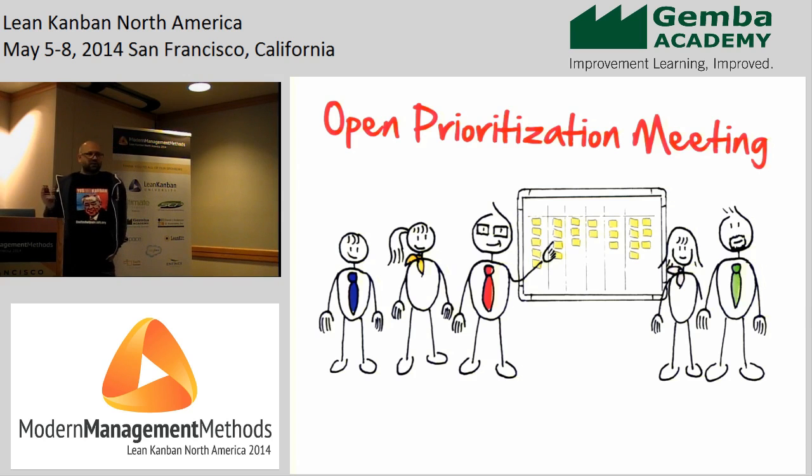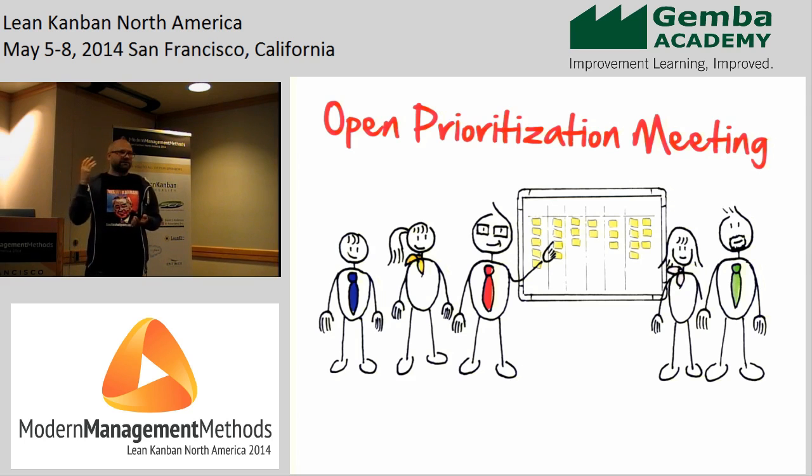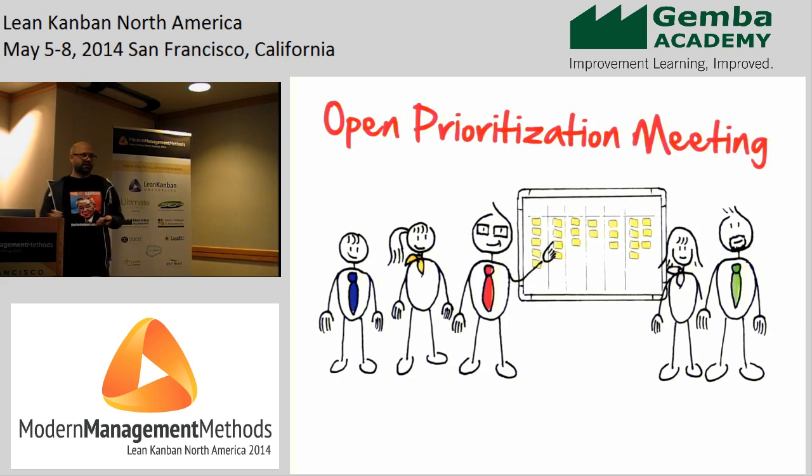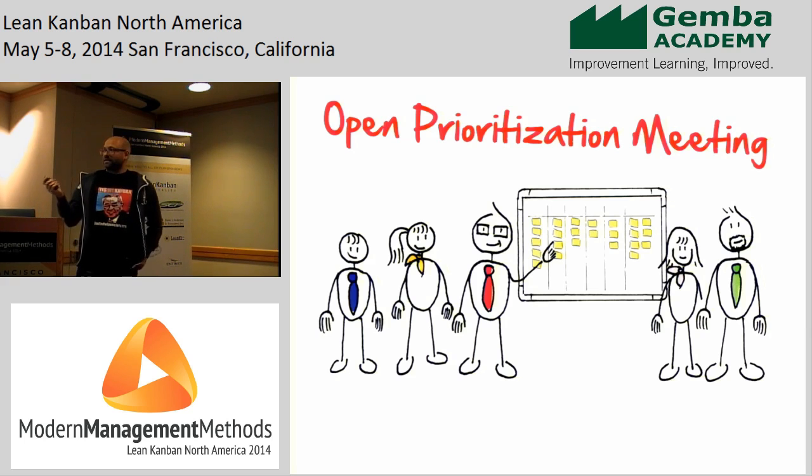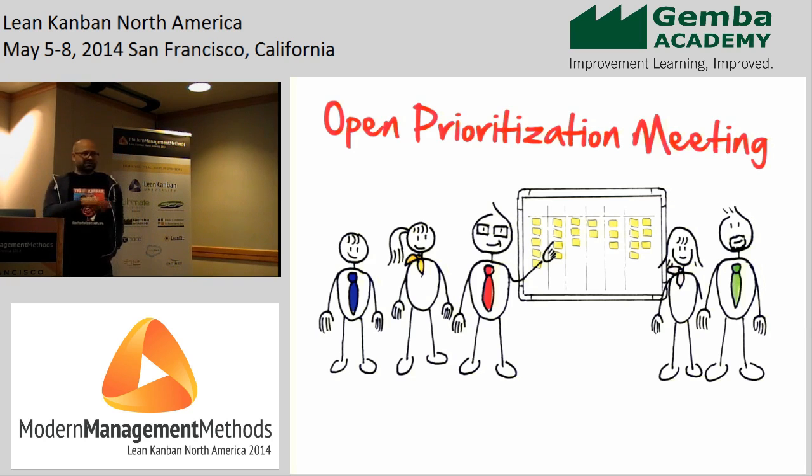And now, at the beginning, everyone who's in this meeting pitches his or her idea and says, I want you to do this, and I think it's really valuable for our company because of this and this and this reason. Now, everyone pitches his or her idea, and after that, they decide, so the team together with the founder and of course the input of the others, which items do we accept and which one do we decline. And of course, they only have so much capability, they cannot accept everything. So probably 50% or even more of the requests are returned to the requester. And they are returned immediately, and that's really important because we don't want to build a backlog. We only have this temporary backlog for like 15 or 30 minutes during this meeting, but after the meeting it's closed again.